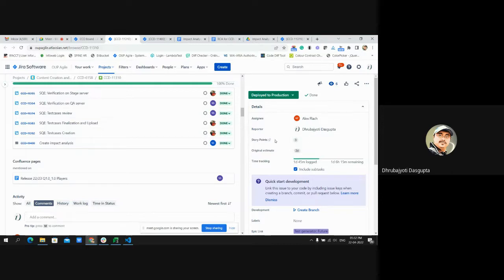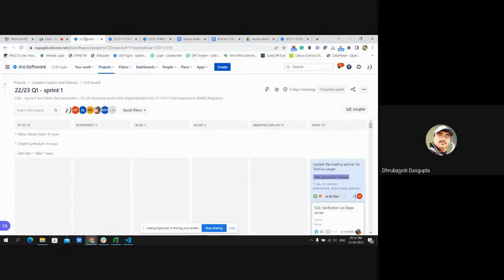So if we think that a ticket's acceptance criteria is huge, then we segregate or distribute the requirement into 2 or 3 pieces if possible. That means in one sprint we only honor 5 story points, so that the developers have inner buffer time to review the next sprint's tickets in advance, do the R&D, and do all the necessary findings in advance, so that it can be documented well in advance and attached, for the impact analysis document or the RCA document.